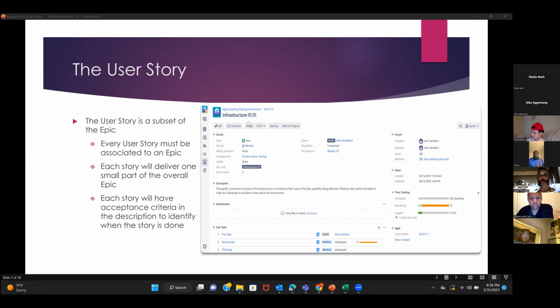in real agile, it's supposed to be no. As a Scrum master, you have to learn how to say no. It doesn't matter even if he wants us to stop by Arlington for just a quick second, because remember, everything we are doing is time-based, right? And we have 2 weeks. We've already planned. We don't want any cancellations or anything to slow us down. So if we planned 10 tickets to work on in those 2 weeks, we are focusing on those 10 tickets. So scope creep is basically the customer adding more stuff to the work that you have already planned.